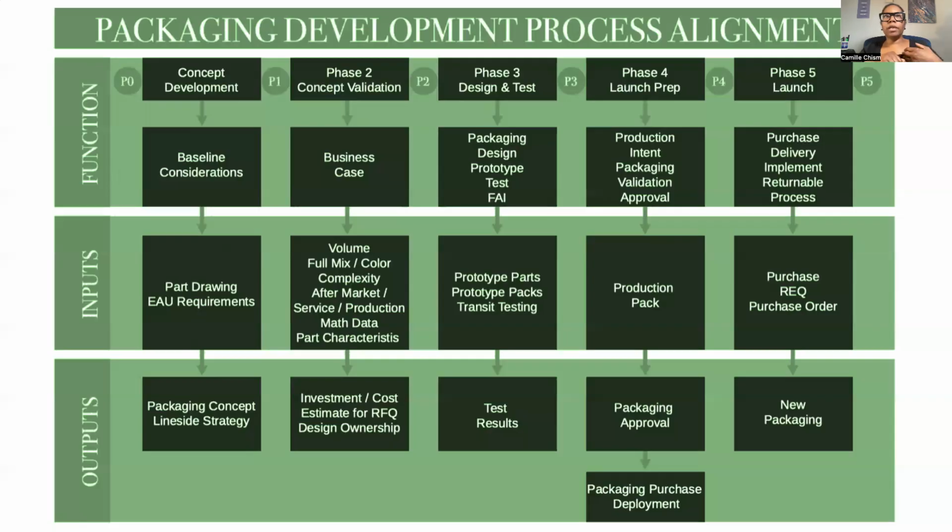So if you know that it's going to take 3 months to get tooling, or a month to get material, or a week to get a test, all those things go into play. And then you will either be responsible for those activities, or someone will be responsible for those activities, and the program management team keeps track. I mentioned the Gantt chart, which is a combination of a spreadsheet and a timeline.